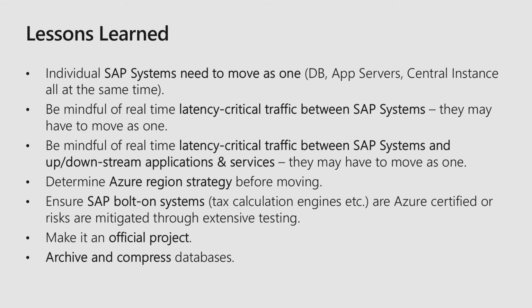And so, in our case, we involved our compliance people kind of late. In hindsight, I wish we would have done it a bit earlier. Make it an official project. Don't do it like us. This was all done on the weekends and in spare time. That was freaking brutal. Make it an officially funded project. You could easily do this in 6 to 12 months if it's a fully funded project.